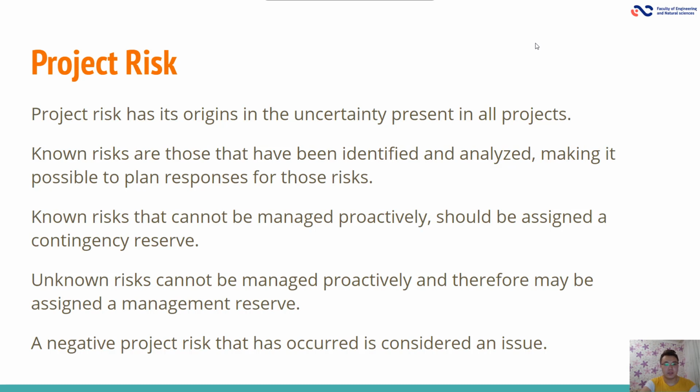Known risks that cannot be managed proactively should be assigned a contingency reserve. Unknown risks cannot be managed proactively and therefore may be assigned a management reserve. A negative project risk that has occurred is considered an issue.